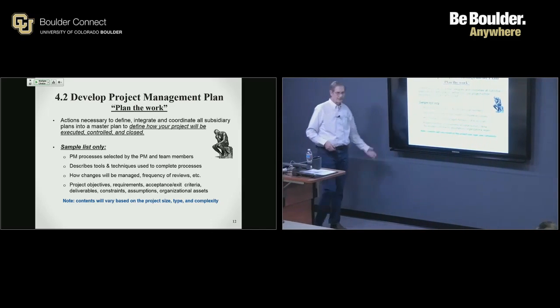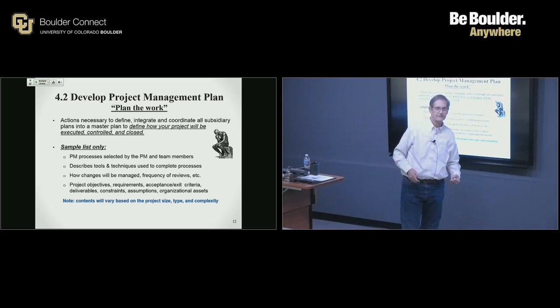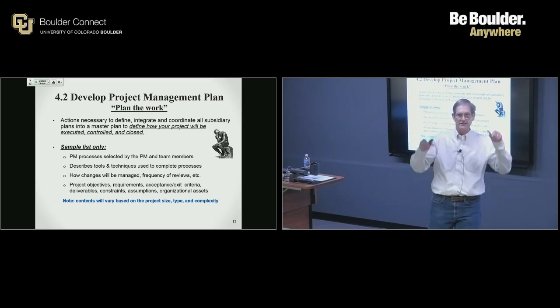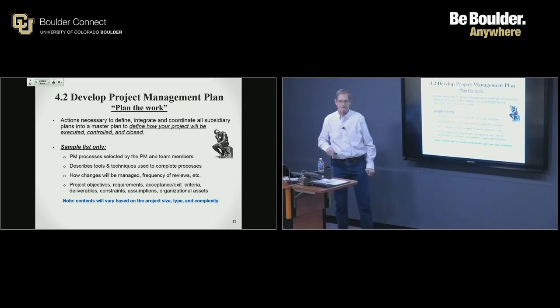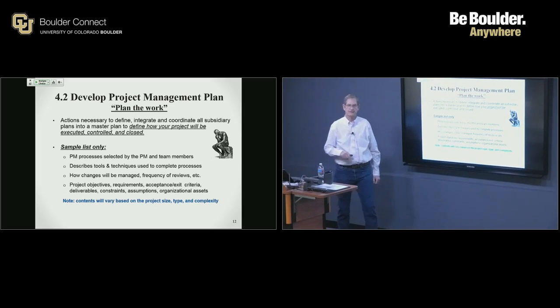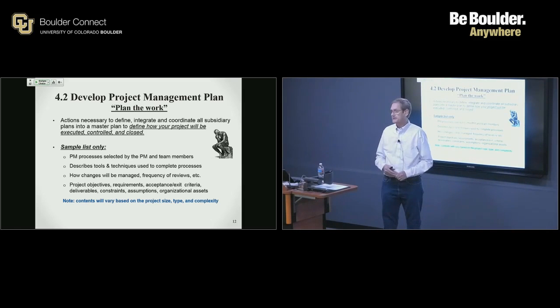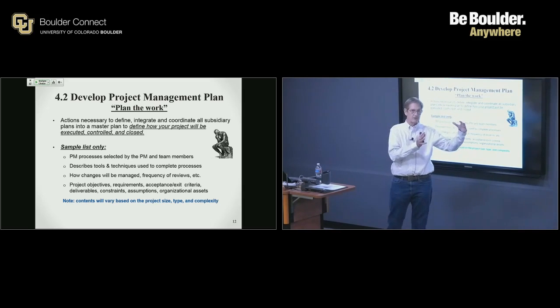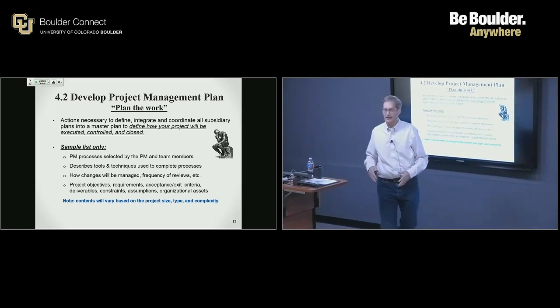So following the processes, remember there are how many processes for integration management? There are 6. Good job, Pippi. There are 6. Remember the first one was to what? Develop the project charter. That's what you all did for your teams. So step 1. You've got a project proposal. You put it out there. Looks good. Sounds good. Build me a charter. Now that's the authorization to begin.